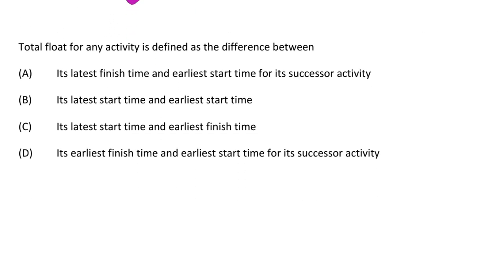Next question: total float for any activity is defined as the difference between — option A its latest finish time and the earliest start time for its successor activity, option B its latest start and the earliest start time, option C its latest start time and the earliest finish time, option D its earliest finish time and the early start time for the successor activity. The correct answer is option B, its latest start and the earliest start time.